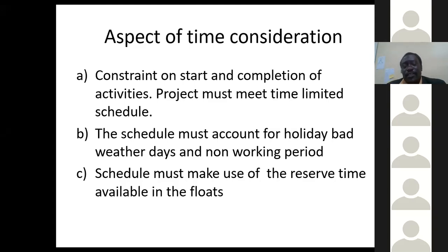So you don't have an excuse of saying because there was a flood, because it was raining. Once you set a plan, you need to set it in such a way that you exclude the public holidays. You also exclude Sunday and Monday, and so on, depending on which days you decide people can work on the projects.